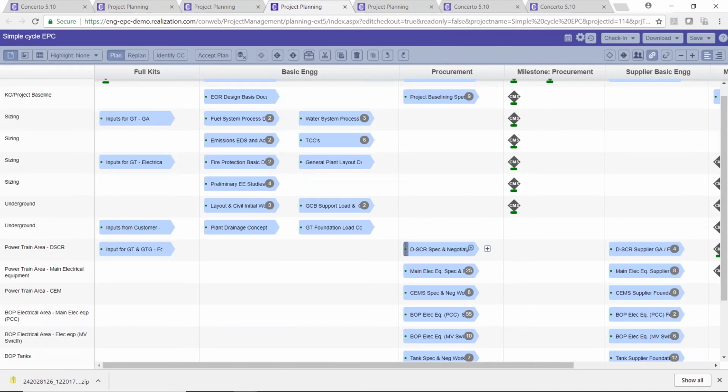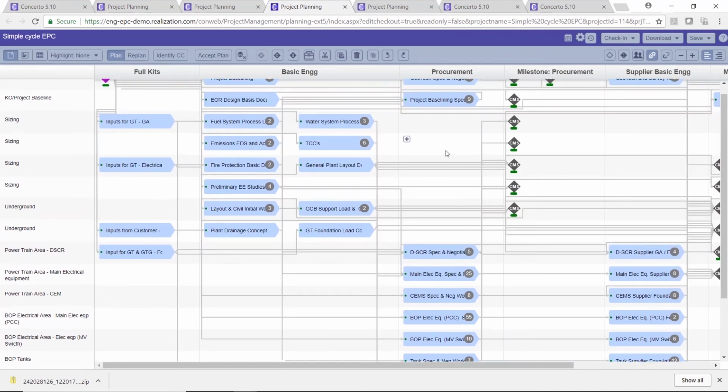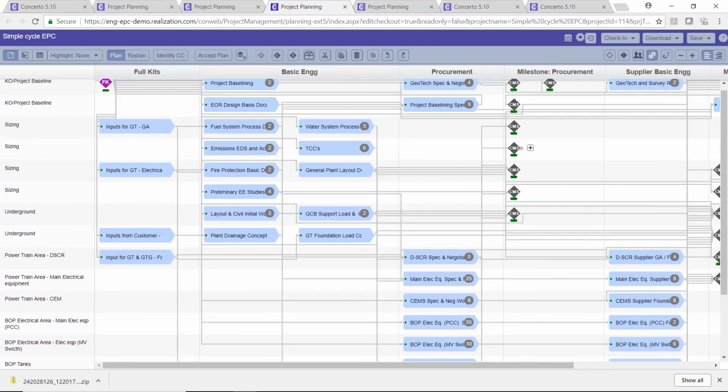And to drive each of these work streams, in this case, many of these milestones are actually tied to customer deliverables. This is the second place that we can use milestones. We want to make sure that we're meeting these customer deliverables, because many times those deliverables may have payments tied with them. So these milestones actually allow us to drive the completion of different streams and make sure we're meeting whatever those customer deliverables are.